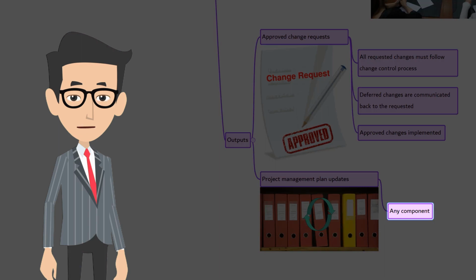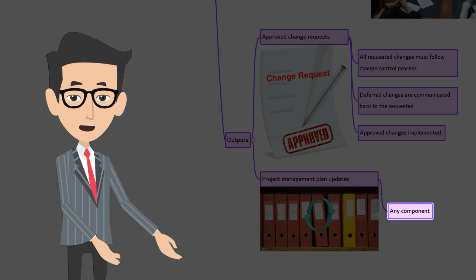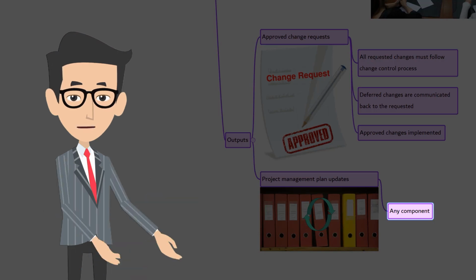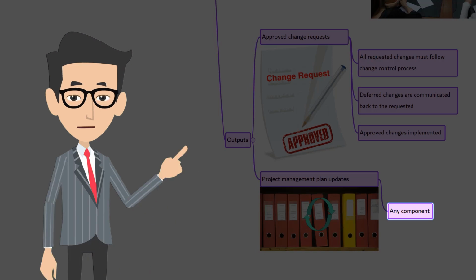Just keep in mind, changes to baselines are made only from the last baseline, meaning the past performance is not changed, but only the future. I know this is obvious, but still I want to emphasize to be sure about it. This protects the integrity of the baselines and the historical data of past performance.